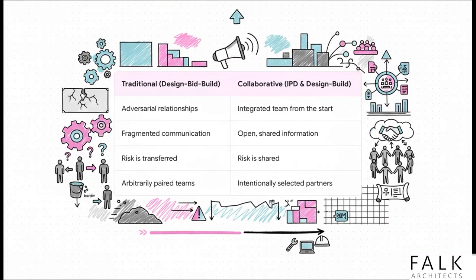And wow, this slide just lays it all out, doesn't it? The old way of doing things, design, bid, build, often set everyone up to be enemies. The architect would design something, then it would be sent out for the lowest bid, and you'd end up with teams who'd never even met. Risk just got passed down the line like a hot potato.